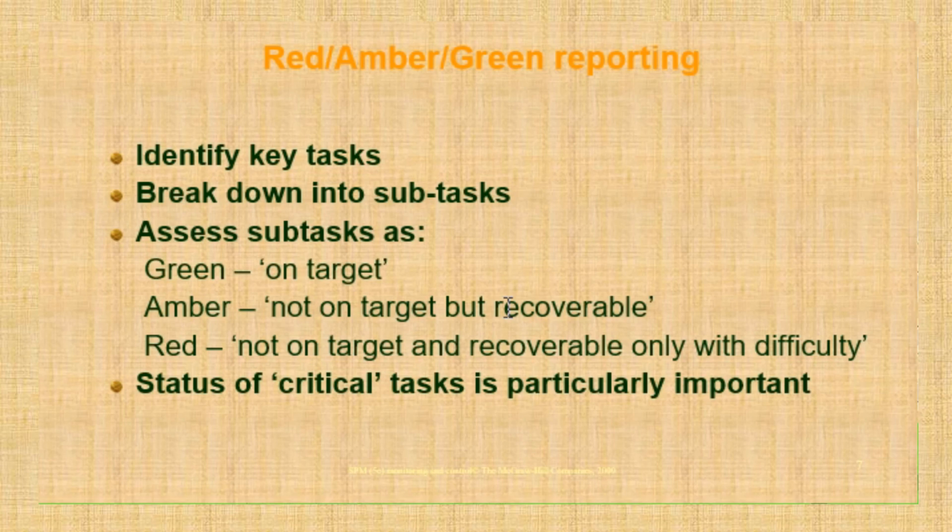For example, while calculating my CPM we get a certain slack time. This slack time is just showing the delay, and if the allowed delay is 4 days but up till now there is only a 2 day delay, this means we are able to recover that.